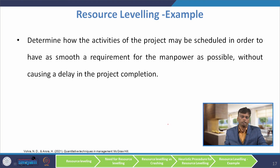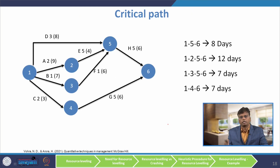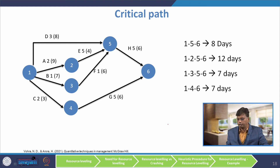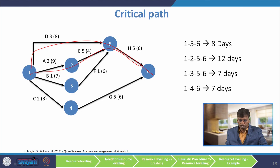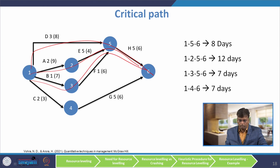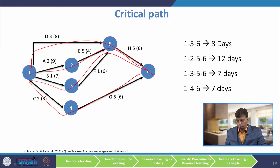The first task is to find out the critical path. The possible paths and their durations are: path 1-5-6 has a duration of 3 plus 5 = 8 days; path 1-2-5-6 has a duration of 2 plus 5 + 5 = 12 days; and path 1-3-5-6 also has a duration of 7 days. So the critical path is 1-2-5-6 with the maximum duration of 12 days.